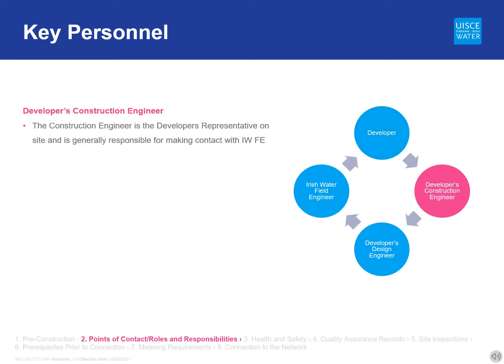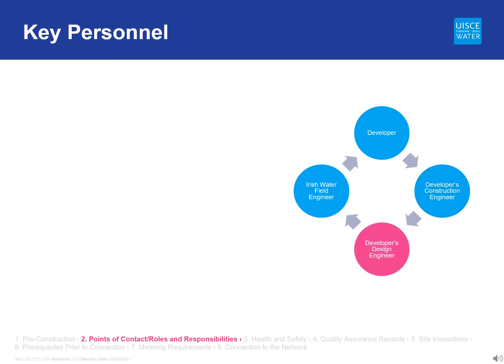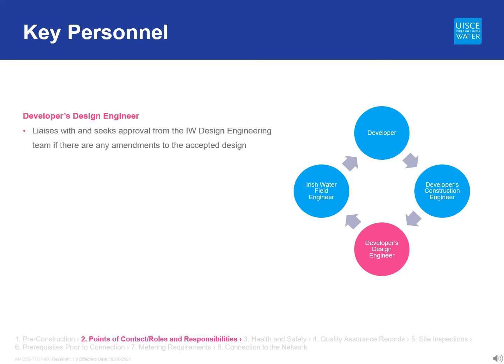The construction engineer is the developer's representative on site, generally responsible for making contact with the field engineer. The construction engineer should also request the attendance of the field engineer for inspections, ensure that all personnel on site cooperate with the field engineer, ensure compliance with the Irish Water codes of practice and standard details, prepare an inspection and test plan in line with Irish Water's requirements, forward the inspection and test plan to the field engineer for review, and maintain the site as-built and quality assurance records. The nominated design engineer is responsible for liaising with the Irish Water design engineering team in case there needs to be any revisions made to the accepted design before or during construction, and is the point of contact for any design queries from the construction engineer.